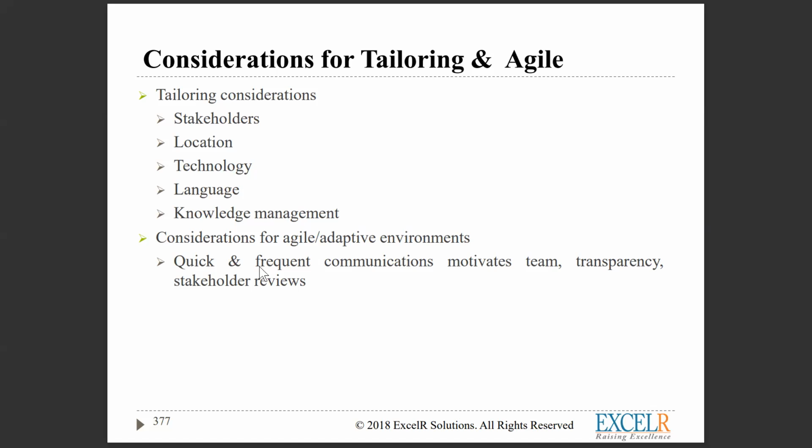Once you prepare and come into the execution phase, what will happen during the execution phase also? You will be transporting module by module and testing it, right? You can't complete everything and then go for testing. You take small things and then put them into your testing sandbox.